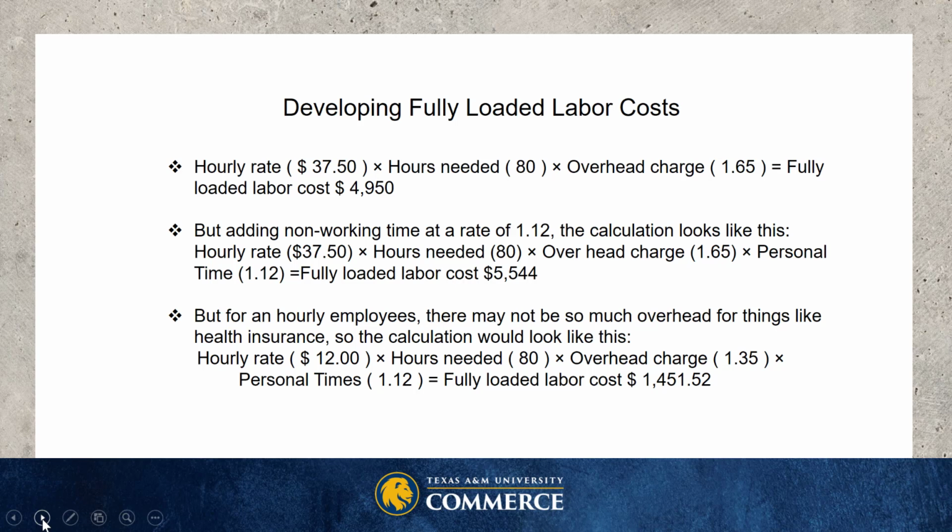But if we add non-working time at the rate of 12%, non-working time would be walking down the hall to the restroom, getting coffee, talking with others, times when we're not working. The calculation is the hourly rate of $37.50 times those hours needed of 80 times the overhead charge times the personal time, and that makes our fully loaded labor costs go up.